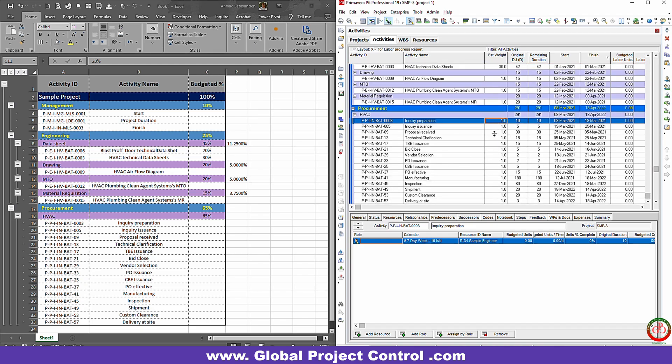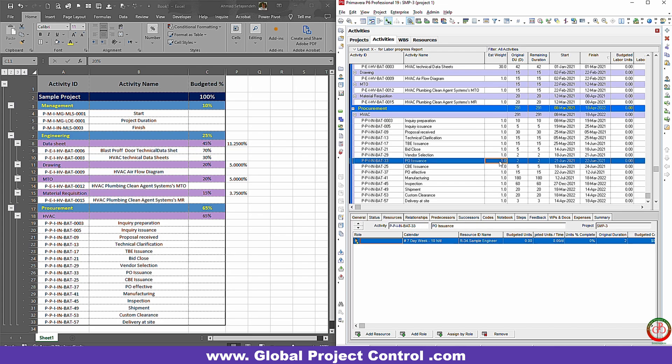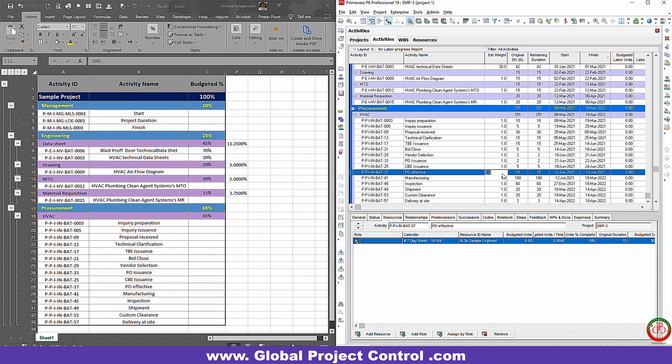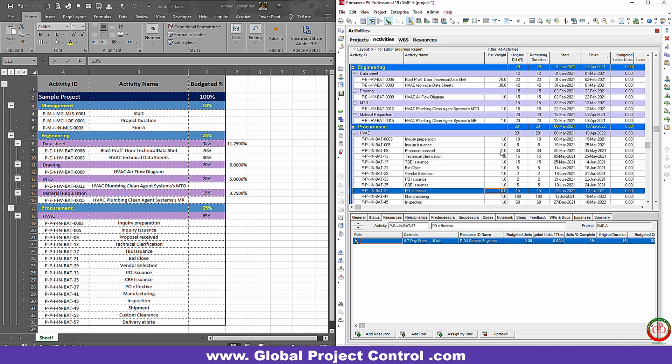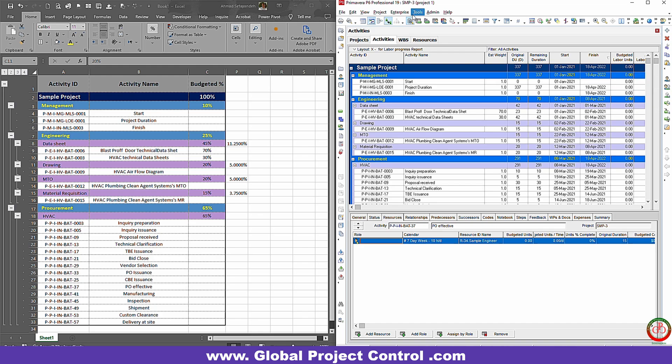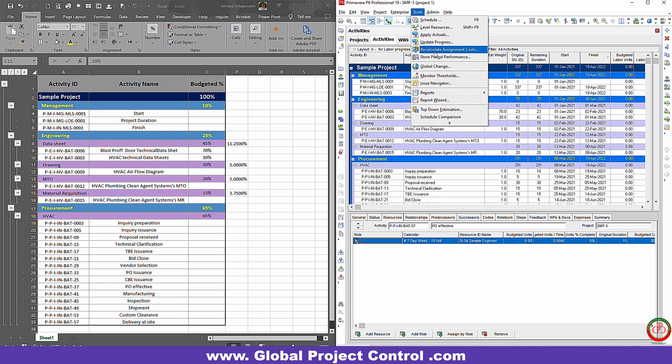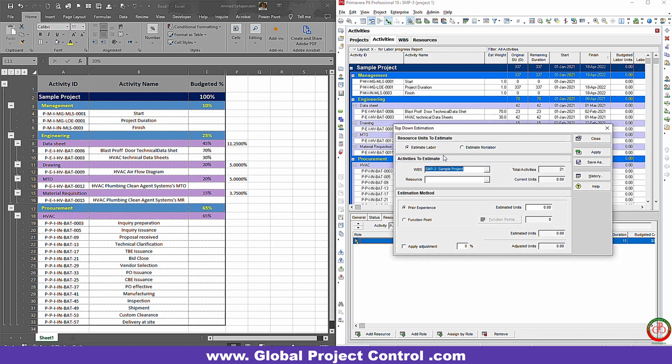For instance, if you try to add something 10 times bigger than the others, the weight factor will be distributed for all activities equally because all of them are equal to one. But I try to make the PO effective 10 times bigger than others, so I assign 1 to others and 10 to the PO effective.